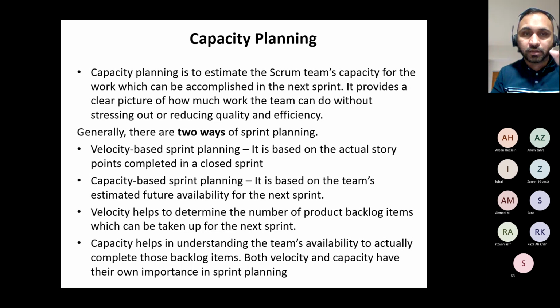It will show you what you planned, which is part of the sprint report in Jira. But velocity is your throughput, what you delivered in a particular sprint, and it is based on the actual story points. Actual, remember, completed, not committed. Committed is when you start the sprint. But what if you commit and end up completing less? So velocity is your actual completion of story points in the previous sprints, not the current one, which you have just started. You look at the previous ones, and based on the velocity you come up with your planning, using the average velocity.